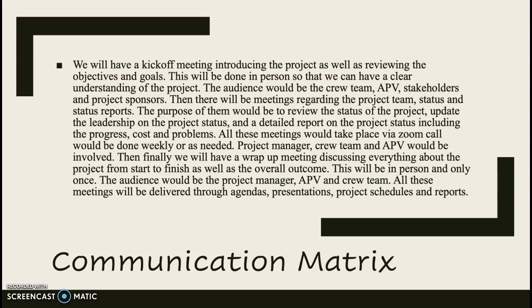The communication matrix. We will have a kickoff meeting introducing the project as well as reviewing the objectives and goals. This will be done in person so that we can have a clear understanding of the project in a whole group environment. The audience would be the crew team, APV, which stands for Association of Poinciana Villages, and the stakeholders and project sponsors. This would be done only once, and that would be at the beginning of the project before we started.